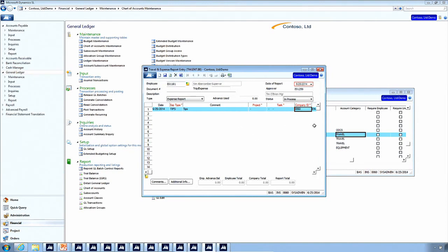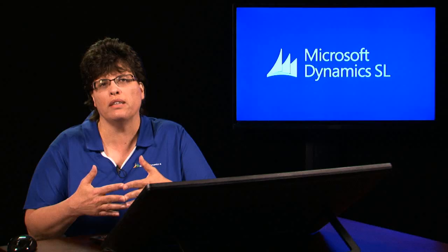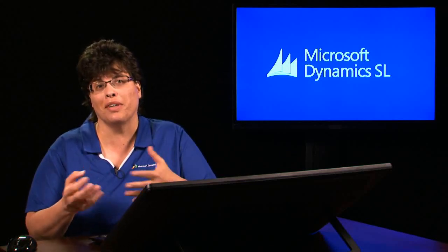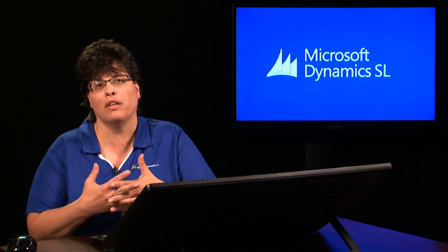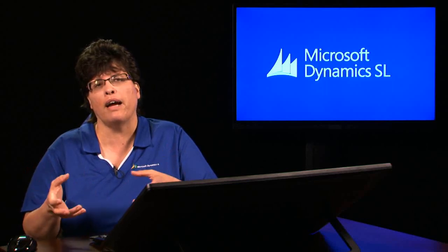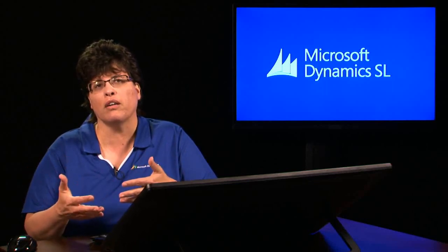One of the other fields that we didn't see in the time entry is this amount paid, payment amount. A lot of companies will have their employees with expense or company credit cards. And so how do you handle that? Because if it's a company credit card, we certainly don't want them entering their expense report and getting reimbursed for that, because then you're incurring that cost two times. So we're going to be able to restrict and allow employees to enter to their credit card too, which will help you reconcile the charges you see come to that credit card.